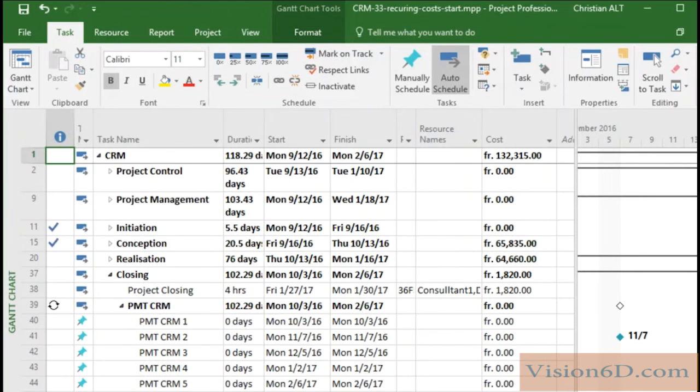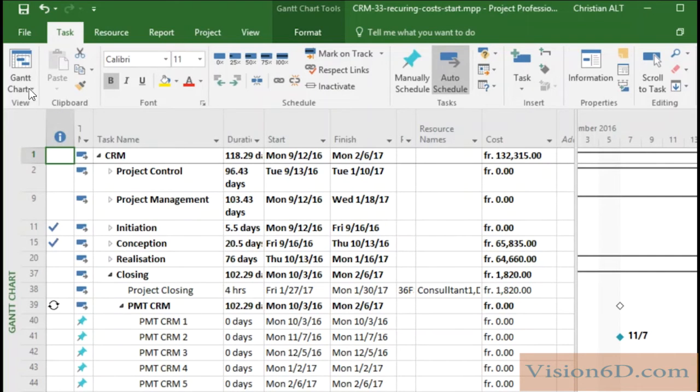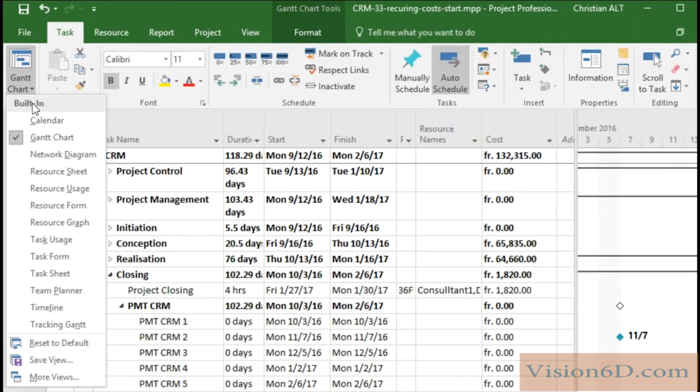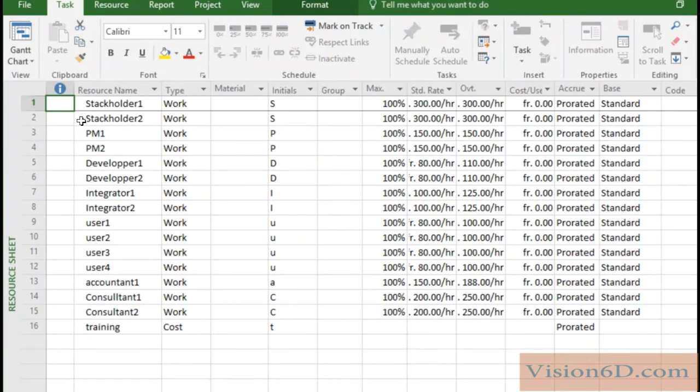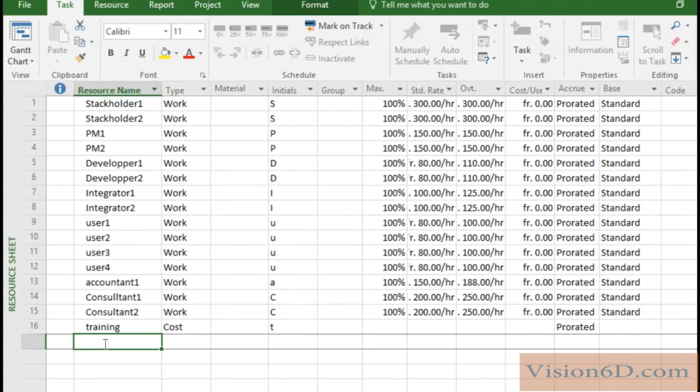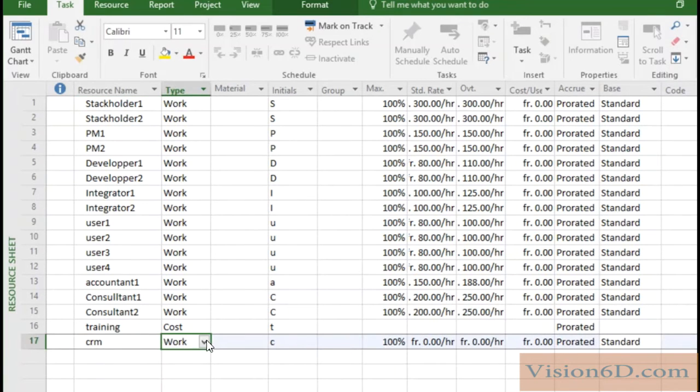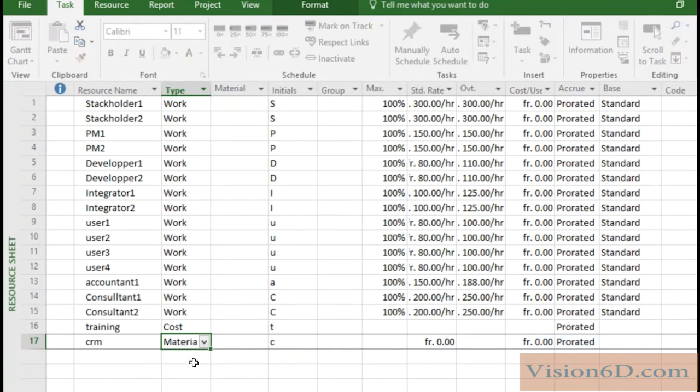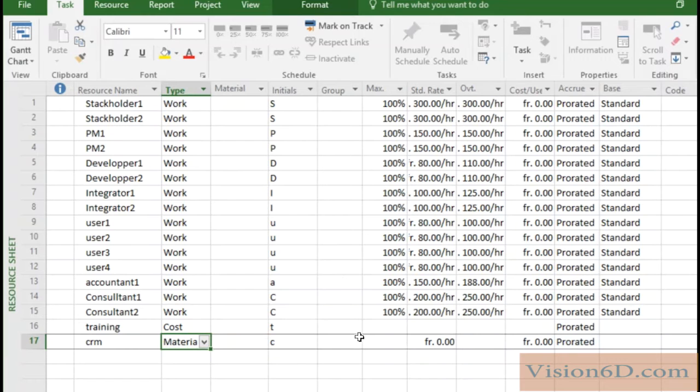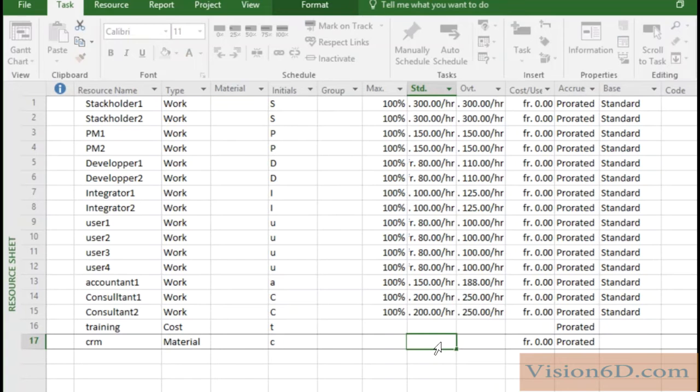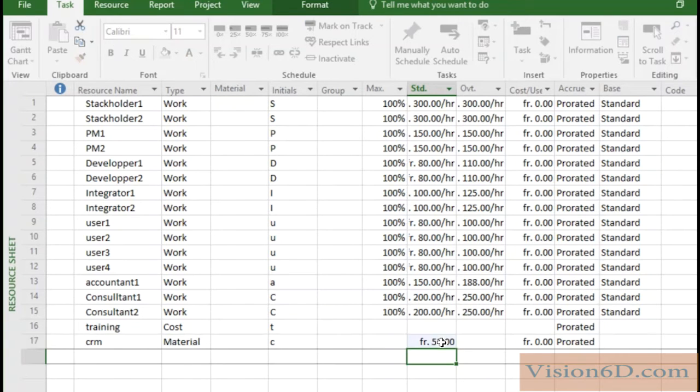The first thing we have to do is to add a resource which represents the CRM license. For that I go into the table resource sheet and here I have all my resources and I will add here a resource called CRM. That resource will be of type material and as you see you don't have an occupation possibility but here we'll say that each license is 50. That's what we have to do.